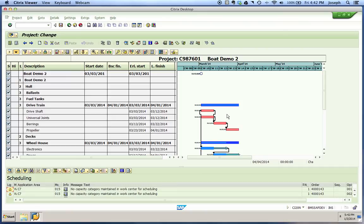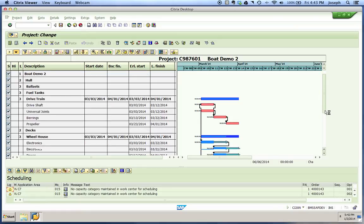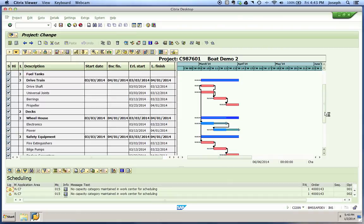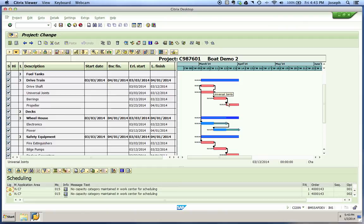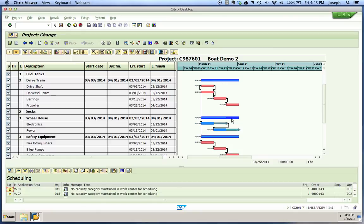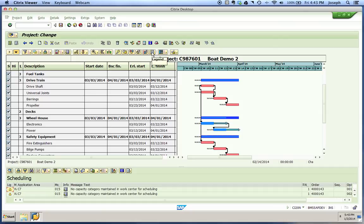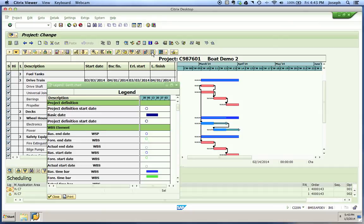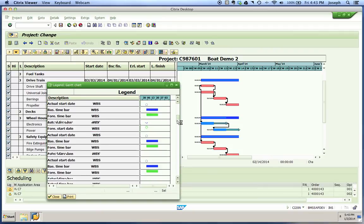You'll notice our colors have changed. What it's showing us is our red is going to be our critical path throughout our project. The blue is going to show the overall timeline. You'll see lines in between or gray lines outside of it. You can always go up to your legend, and your legend will show you and define what those are, what all those lines depict in your graph.